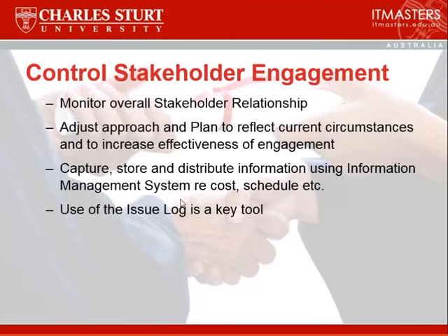Moving along to control stakeholder engagement, which involves making sure that you monitor how things are going with the stakeholders. You might even ask stakeholders how they're feeling about the project. Are they getting enough information? We adjust and maybe change the approach that we're taking if we're not satisfying the stakeholders. We capture, store and distribute information using an information management system about all aspects of the project. And we have an issue log, which is a key tool to us understanding how to control the stakeholders.